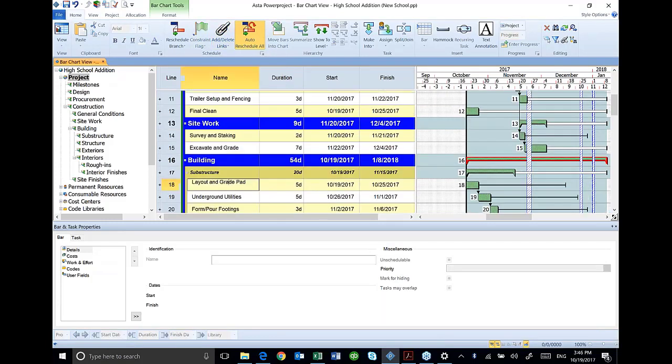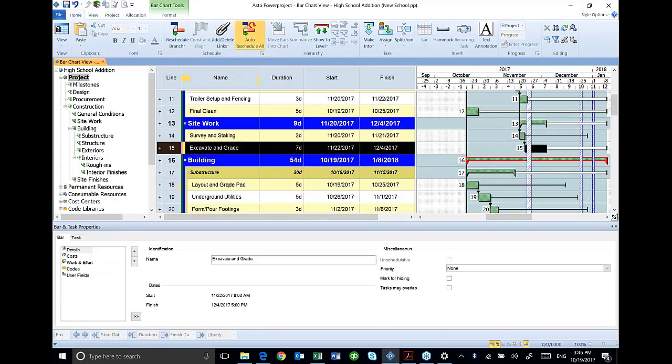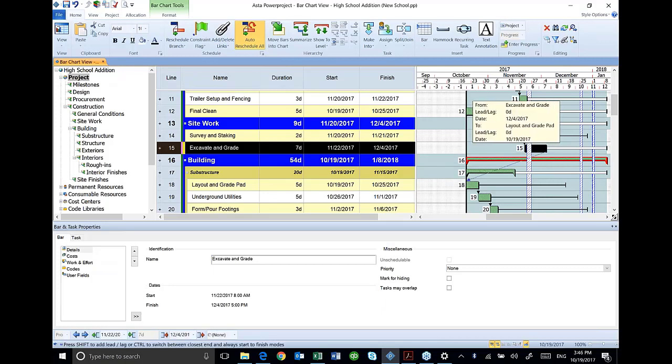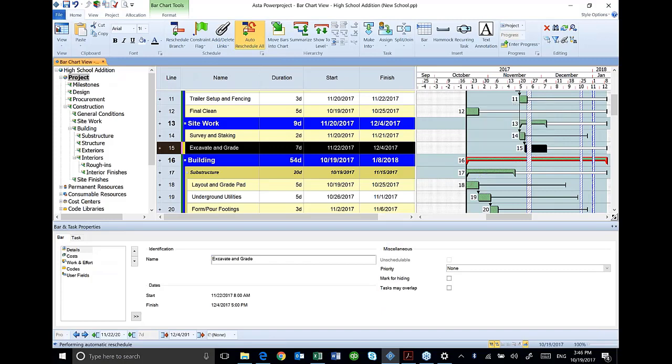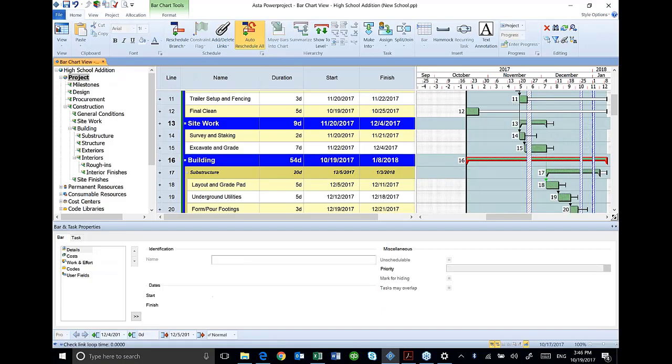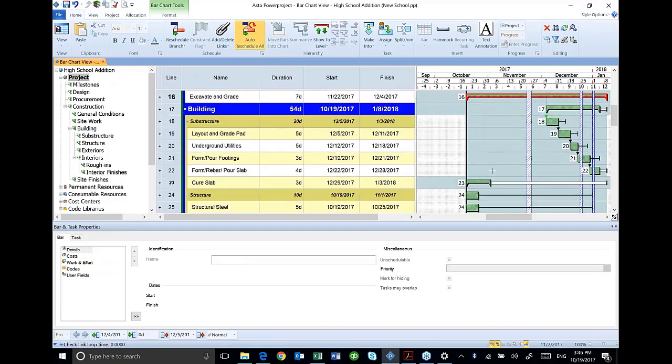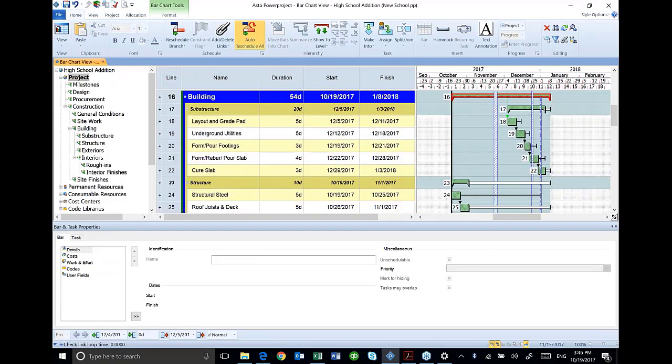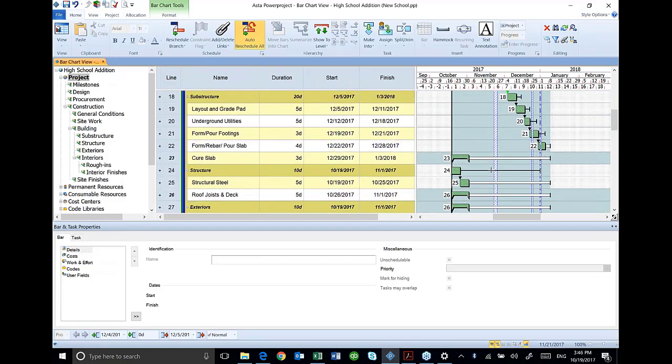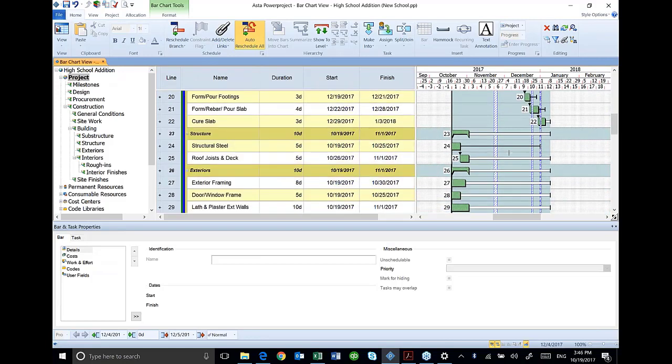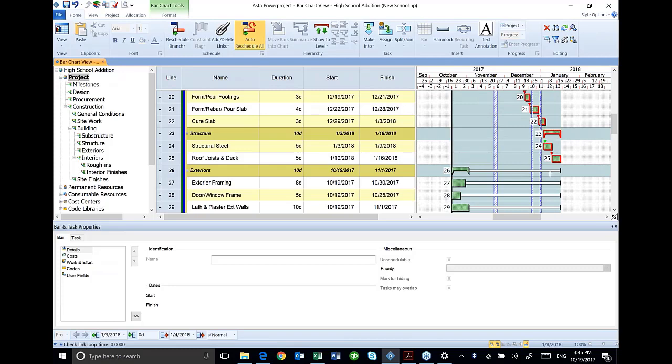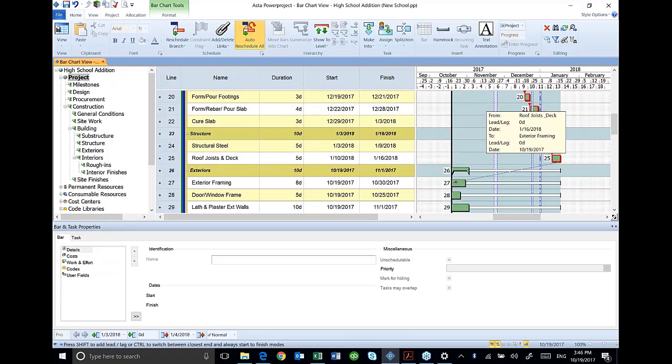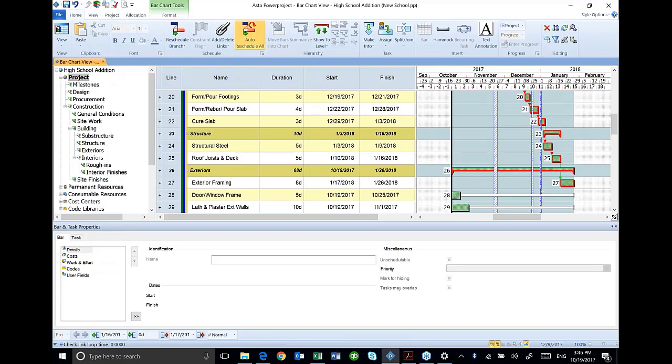To do my layout and grade, I need my excavation done. I can just use my linking tool. If I want to do that, that's pretty easy. Tie that in there. Notice I kind of skipped over my final plane. We'll come back to that in a minute. My cure slab is going to allow me to start my structural steel. My root joist and deck, once I get that in, it's going to allow me to start my exterior framing.